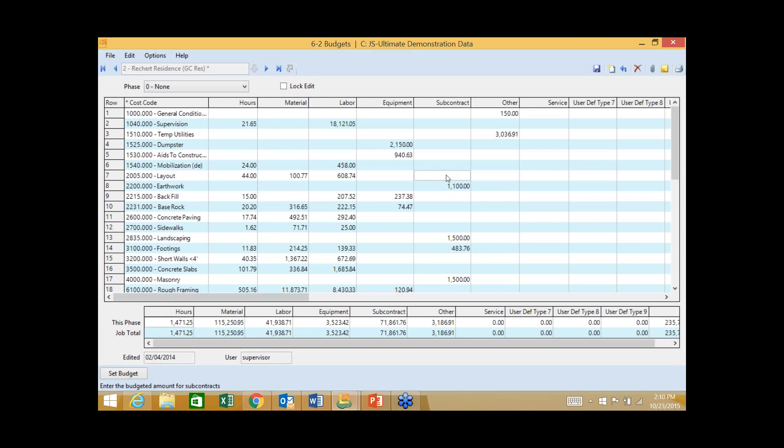Now before I leave here, a lot of people tend to ask what type of security controls do we have. They're actually fairly robust. An example is we can actually choose to lock this budget down and control who has the rights to unlock this budget and make a change to it. Otherwise, the only other way someone could change the budget is by doing a change order, which of course produces an audit trail.